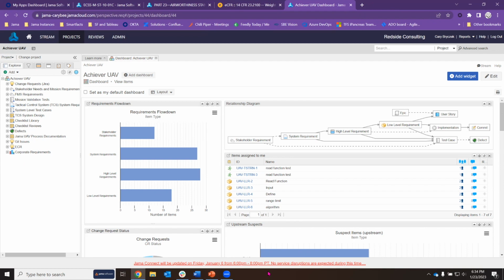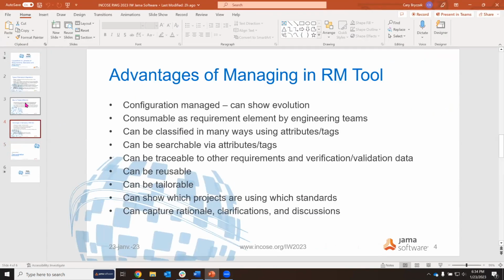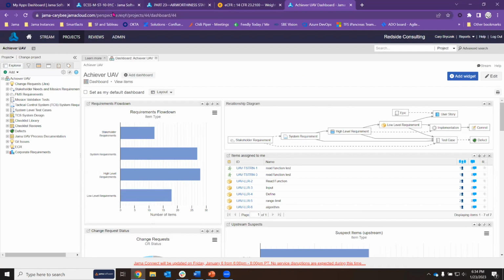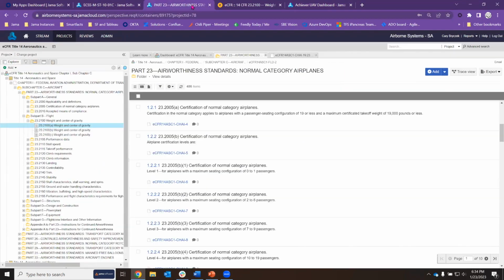Right. Well, it's Mike Ryan. And I think it also harks back to the distinction Lou was making between processes and products and people. That if the requirement is a process requirement, it'll be on somebody to do. So it'll be a requirement which is allocated to somebody to perform rather than on the product to actually have as a feature when it's verified or validated. For example, how design reviews are conducted, right? Right. Yeah, and you know, who's responsible for the regulatory process, or who's responsible for the T&E, rather than the actual verification of the requirement itself.